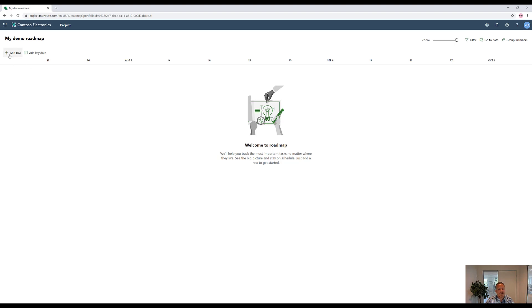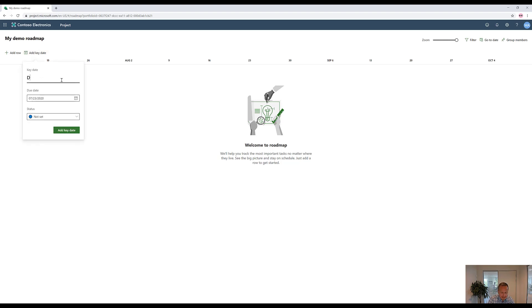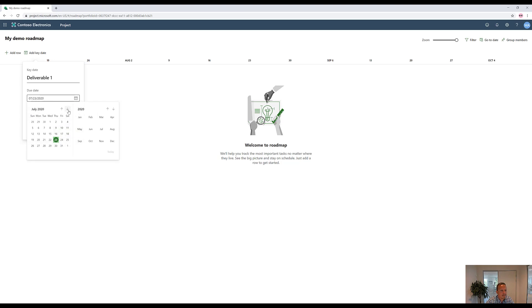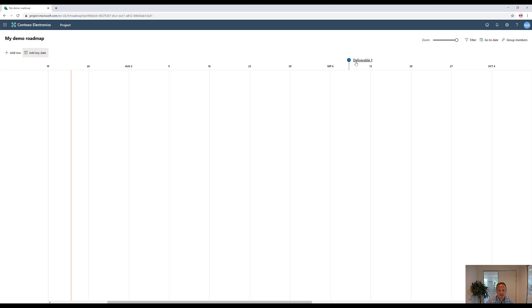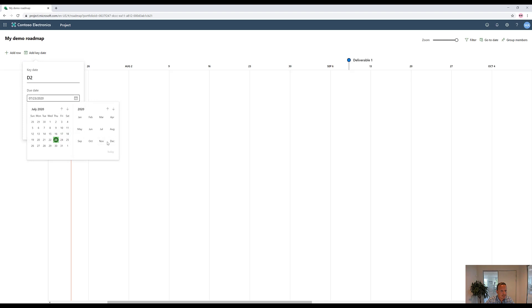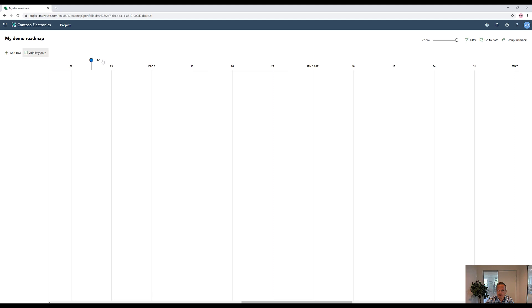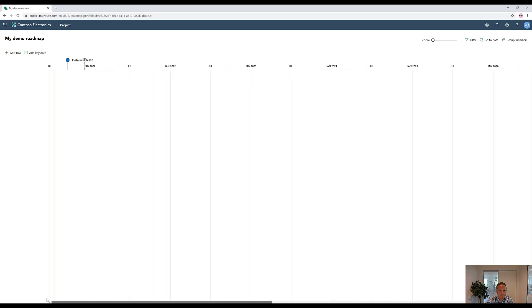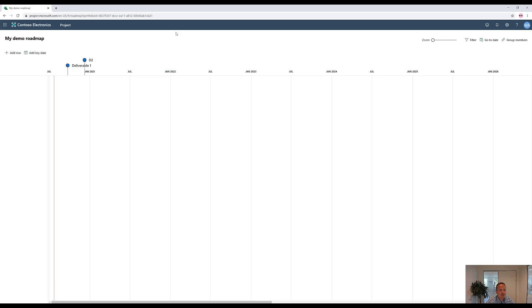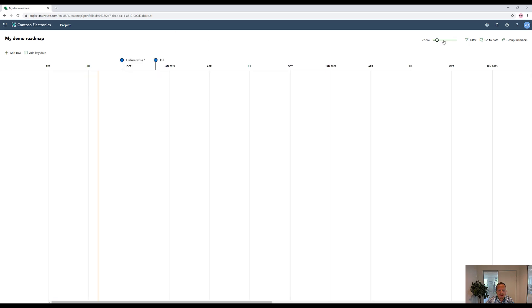Then we can go to add row or key dates. Key dates are your top-down key dates to track. So here you can go in and say deliverable one is going to happen or should happen from a planned perspective on September 9th. Status is not set, but we can actually have on track, at risk, and so on updated manually or by a flow that automatically updates this based on some certain task information. Now it shows you. Let's make another one. Deliverable two, which is going to happen somewhere around November 25th. So now we have deliverable two here as well. And we can zoom out to better see exactly what's going on across all your projects, across multiple months and years.